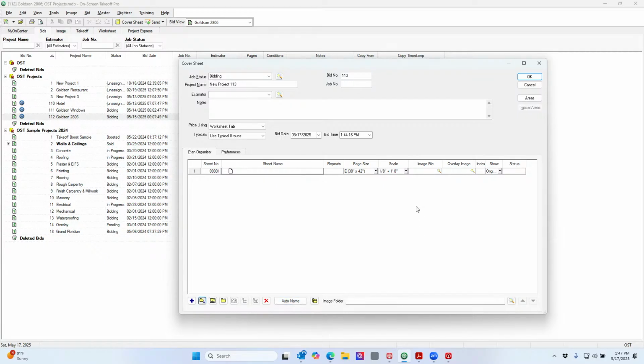The last thing I also talked about on day 2, when we were talking about earlier, the change order feature. If you ever want to overlay images, you will have the original file. You will click this little magnifying glass right here for your original file, which it should already be there. And then if you had a change order drawing, it must be scaled the same. It must be scaled the same, but you can actually pull that file in by using this magnifying glass, and then it will overlay those images. Okay, I'm just telling you about that. You won't use it that often, but it's available for you. And I'm sure they have a YouTube feature that'll teach you more about that.